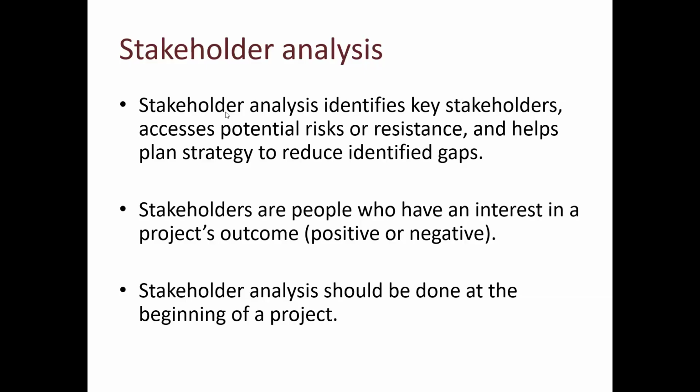So back to the definition. Stakeholder: anyone who can affect your project either positively or negatively. He can facilitate the change or he can block the change. Again, I can't afford this surprise. After defining, measuring, analyzing, improving, the IT is resistant. That's why we are doing a stakeholder analysis. We need to understand and focus on resistant people beforehand, from the early beginning, to avoid any problems. Is this clear now, Dina? Very good. Most welcome.